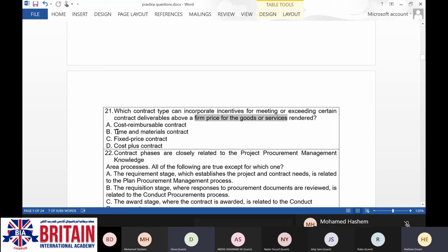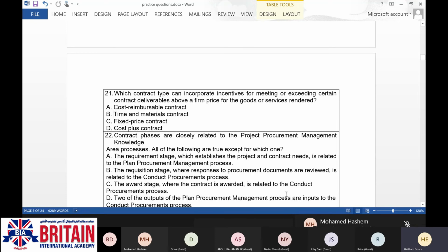Okay. Time and material contract. The scope is not clear to me, like the design example which we have given many times in our course, or the marketing campaign which we have discussed many times. I don't know the scope. So based on the scope which is going to become clear day by day, and based on the effort which I'm going to exert inside your project, I'm going to define how much I'm going to gain.